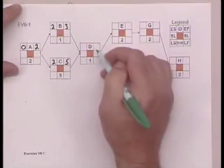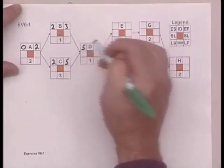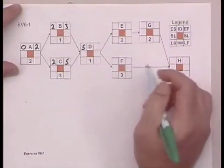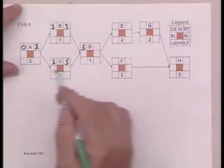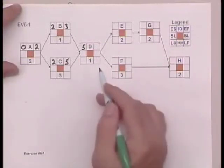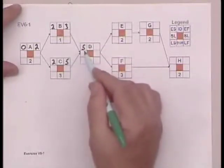D can't start until both B and C are completed, so we choose five, because that's when C is completed. Now, when you're going forward, one thing to keep in mind is always add and always choose the upper value. Here we have a choice between three or five. We choose the upper value, or the highest value, that's five.